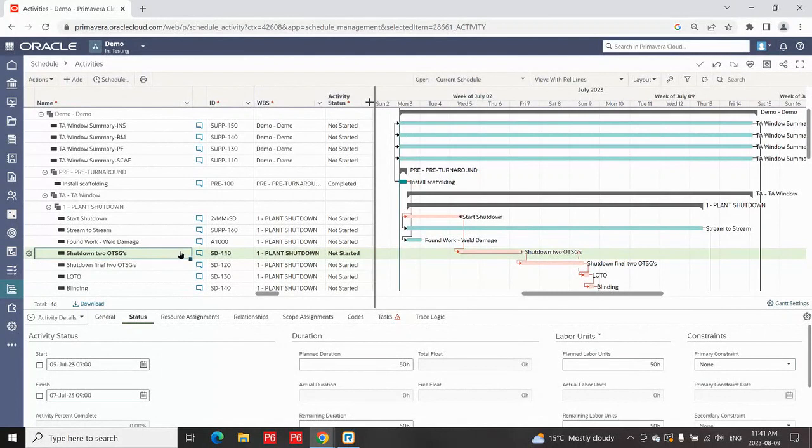If there were some questions you wanted to ask, for example, on this activity that was updated, but the plan is it's actually going to go later than it should have, you can start the activity and leave it ending on the 7th and ask the question, or if you have time, find out the answer before you do your updates, whatever it is you need to do.